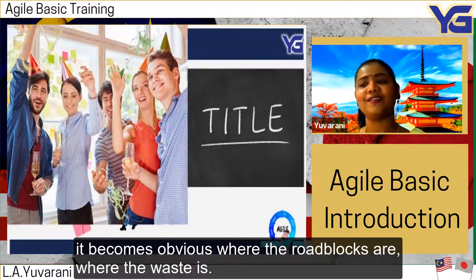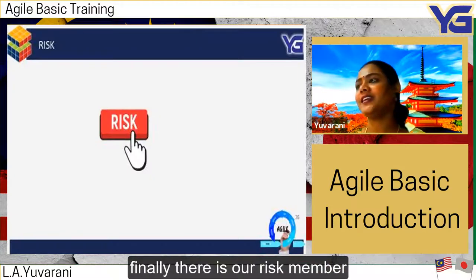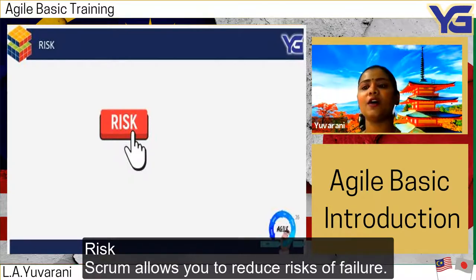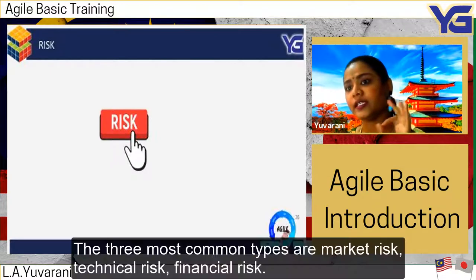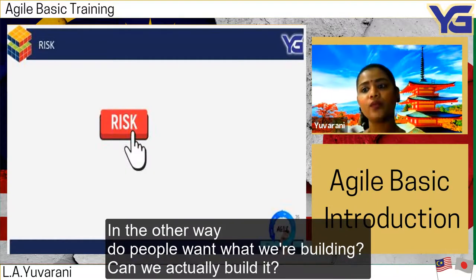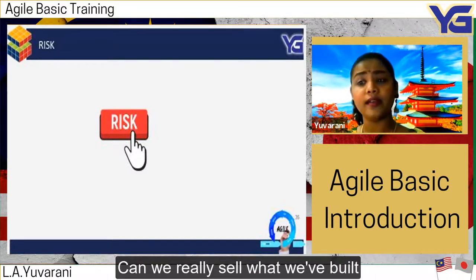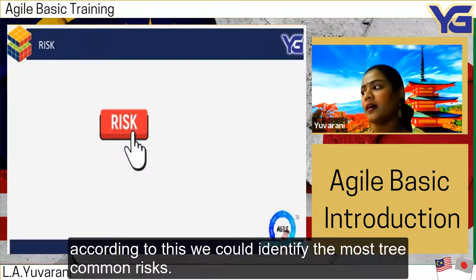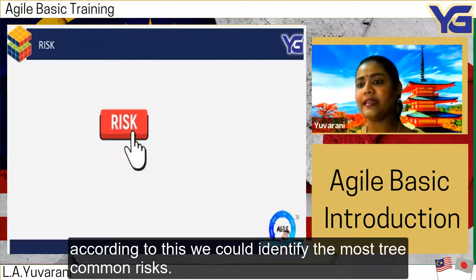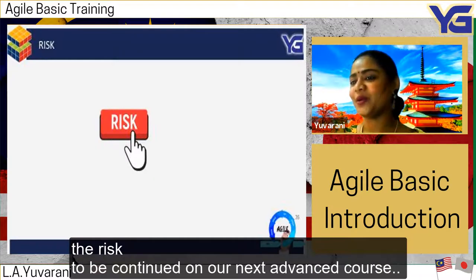Scrum allows us to reduce risk of failure. The three most common types of risk are market risk, technical risk, and financial risk — or in other words: do people want what we are developing, can we actually build it, and can we sustain what we have built? This risk management framework helps identify the most common risks. Details will be continued in our advanced course.